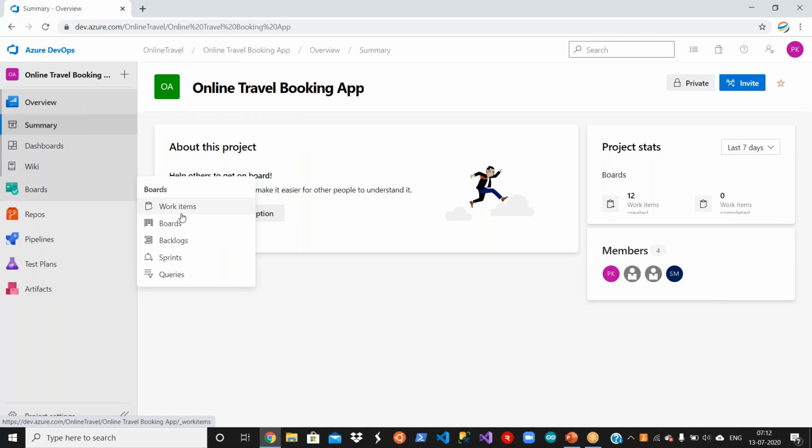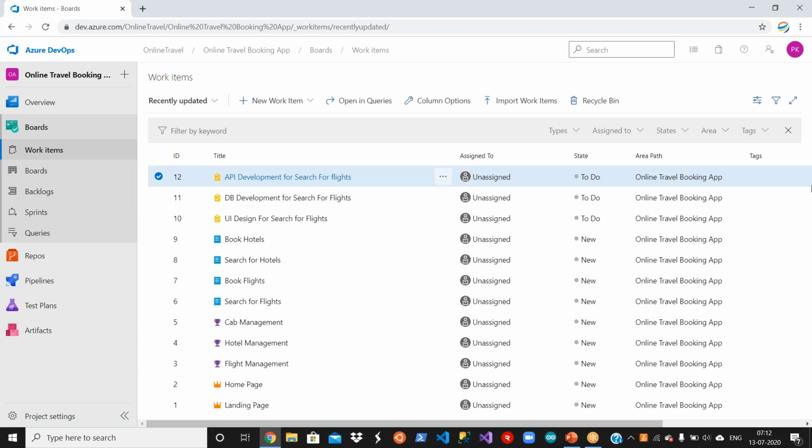Go to the boards. So we'll start from the epic itself. Generally, epics will be assigned to some team leads because those are the parents, right? That contain a number of additional items, like features, and then you have your product backlog item and tasks. Tasks are the leaf level one where a developer can take it and work on it, because under a feature or epic you will have more than one, right? It can be 10, 15 tasks or product backlog items as well. One person obviously cannot work on it, but a lead can take it, and the other tasks can be assigned to different people. Okay, just giving a real world scenario.